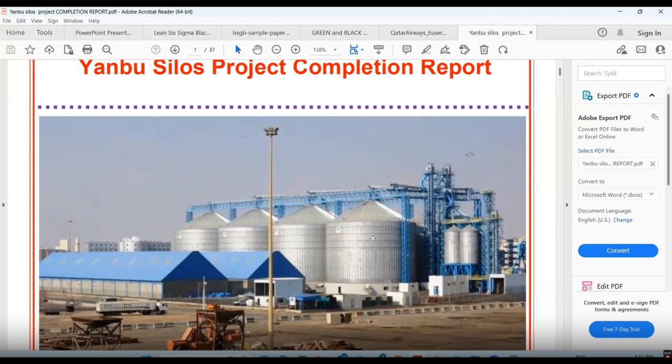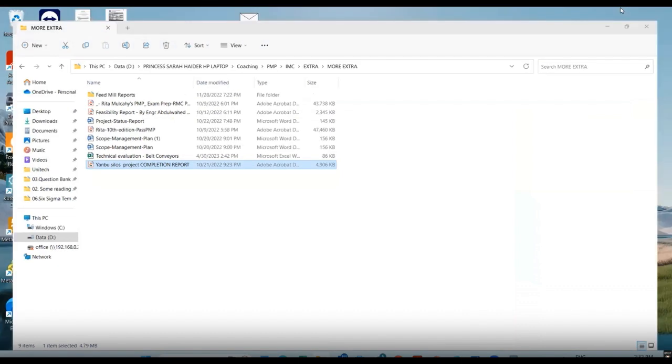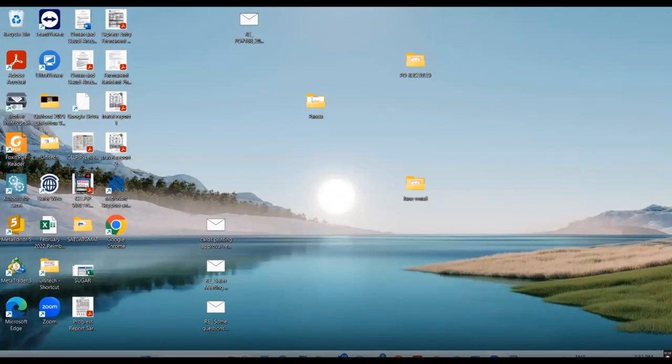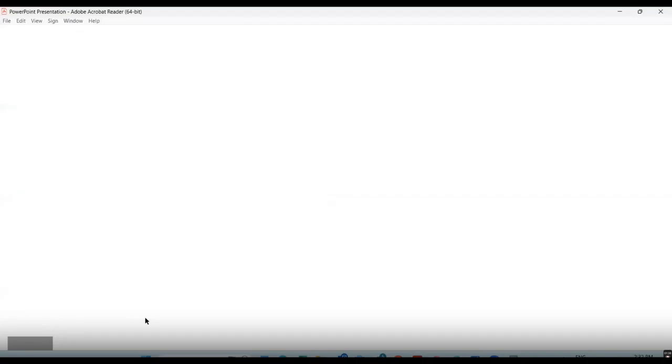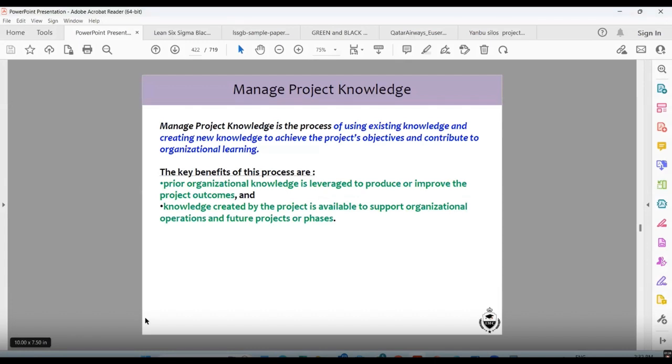So we asked the company why it is getting corroded. They said it is already galvanized, it should not. Then we got it checked by some experts, and we came to know that when we were doing this particular project, we had 125 mm galvanization. Now they said that if you want it, it should be a minimum of 250 and above galvanization. I'm not remembering the unit, 250 or more galvanization.